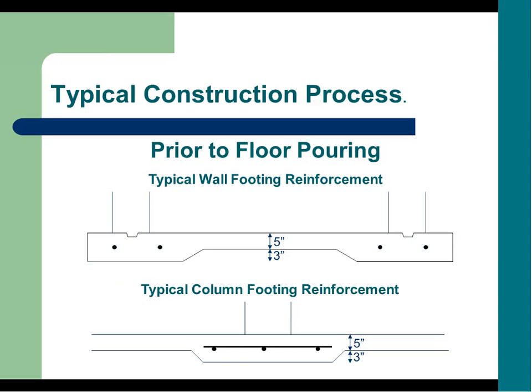One note that I was asked by George to mention is we have had an engineer submit plans that omitted the reinforcement of the columns as not permitted. This engineer is trying to cite an error in our checklist for construction that omitted the reinforcement. It is being fixed, and we have and always will require reinforcement under those column footings.